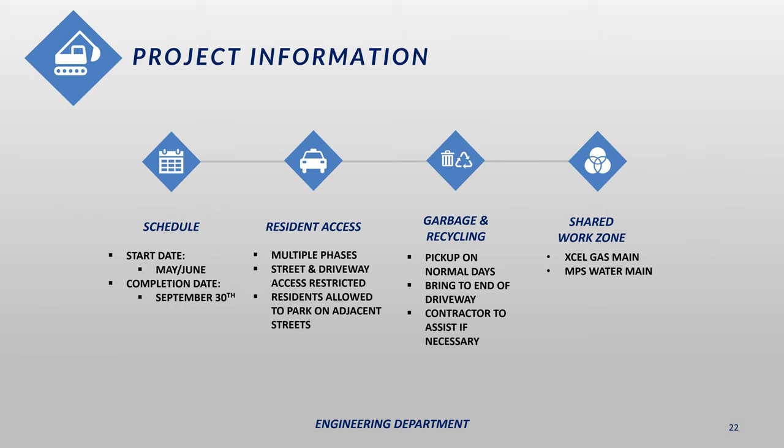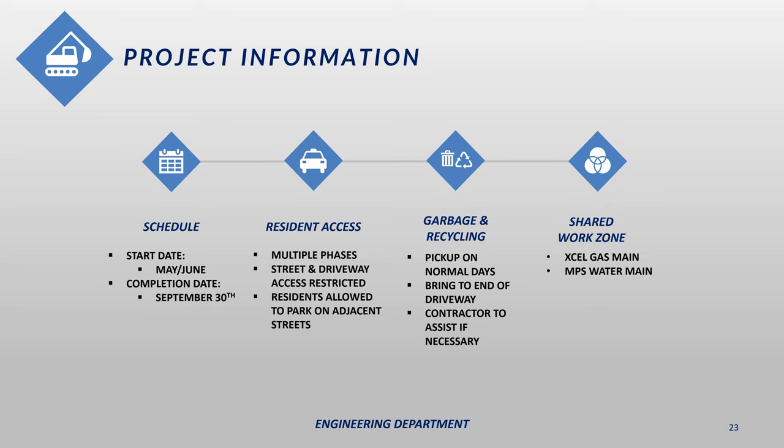The anticipated start date for this project would be sometime in May or June. I'm expecting the contractor will want to get an early start, but it will be dependent on the contractor's schedule and weather. We will likely hold a pre-construction conference in April, at which point we'll get a schedule from the contractor. The city will send out notifications to all property owners along the project area with the approximate start date at that time. The final completion date for this project is September 30th, though the contractor has that entire window to complete the project, and it may be completed in phases.